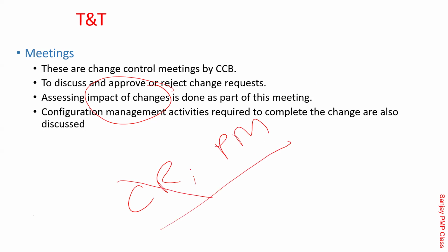Shishir, now coming back to this, is all this route called a CR, project plan, and so on, when it goes to Agile, they are not applicable. Are you getting? Yeah. Because if there is a change happening in between, they will say go back and ask the product owner. Right. In the product backlog you can change anytime, there is nothing to worry about because I have not taken it for development. Once I take it into the sprint backlog, then I can't change it. That becomes a problem for me, correct? Right. CR and project management plan are not so relevant in Agile. I will not say they are irrelevant. They are not so relevant.